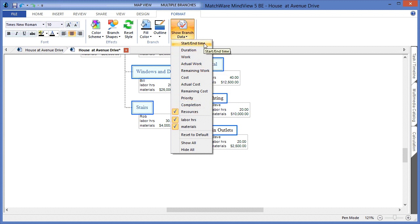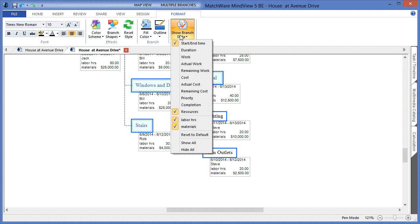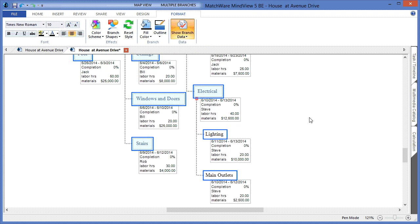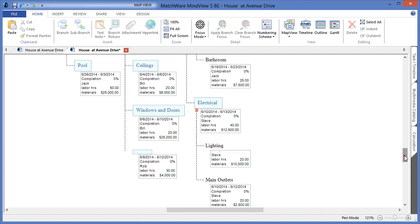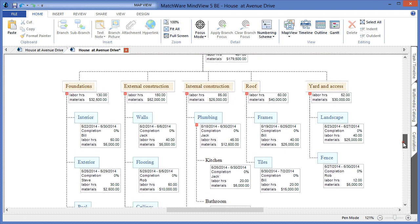In this case, we will choose start and end time, and I'll also choose to display completion levels. As the users update completion levels within the system, the total and calculations will be updated accordingly.